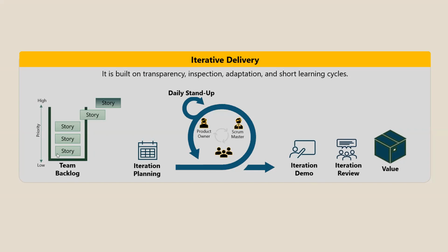And of course, some Scrums have 2. There's a product backlog, there is a sprint backlog, but we just have one backlog at a team level. Why does SAFe say we just have one backlog, and why are they adopting a different naming convention? It is to keep the terminology methodology neutral. Like I've said, whether you come from Scrum or Kanban, you should be quickly able to adapt to SAFe and move forward. So the team backlog contains all the requirements that may get fulfilled in the future. Why do I say may? Because a requirement can become obsolete and be taken off.